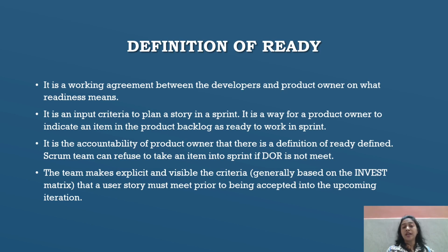The team makes explicit and visible the criteria, generally based on the INVEST metrics. We have learned these INVEST metrics in previous videos. Just go through that video once to clarify the INVEST metrics that the user story must meet prior to being accepted into the upcoming iterations. Okay, these are the definition of ready criteria.